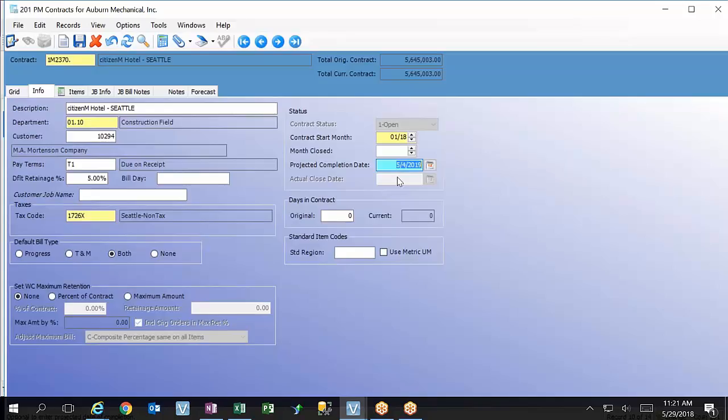Because if you don't ask for days in change orders, they don't give them to you, right? If you say, oh, it's gonna take me more time to do this now, and you don't ask for any, I'm pretty sure they're not gonna give you any. It's kind of like anything else in life.